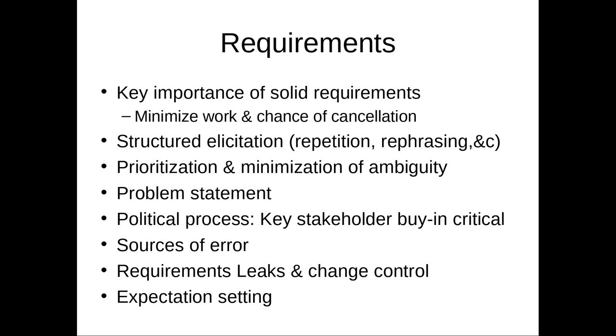We talked about structured elicitation. Look, I'm looking for practical tips here. One of them is, repeat back what you heard in your own language, or have different people on the team that are eliciting it, each say what each of them heard. Have multiple people present so that if something is said, it's more likely it's picked up. Rephrase it when you state it back so that you're not just parroting the words back without knowing what they mean. Say, I think what you meant in lay language is this, and they may say, oh, no, this is a very specific meaning in our terminology, in the language of accounting. When we say this, it has a very specific meaning that's not part of what you heard.